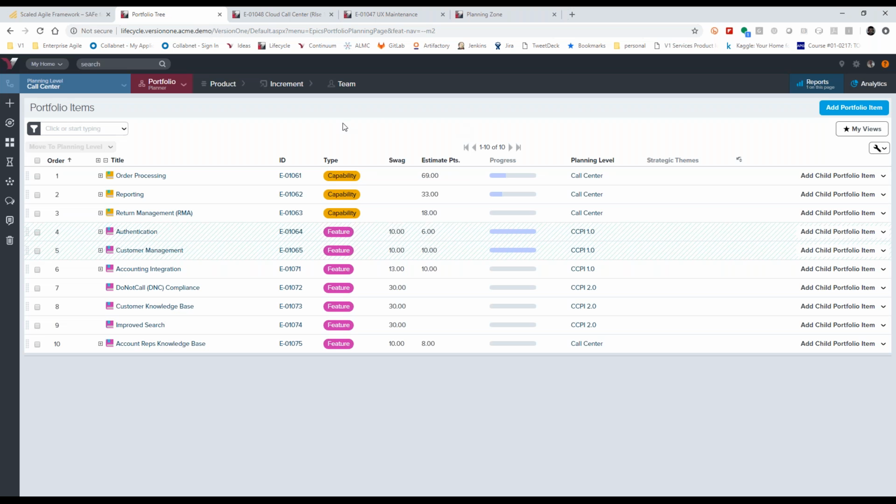So if you don't have normalized story points, then you'll have situations like that where one team for a PI has estimated all the work that they can do to be 100 points, and another team says they can do 150 points. That just means that the teams' stated velocity is slightly different. That probably means that the team that estimated at 100 points is estimating larger items in the backlog. So if you looked at their cycle times, my guess is that you would see that that particular team works on a story a little bit longer than the other team. The other team is able to complete stories a little bit quicker because they are smaller. They're chunking out their stories in smaller slices.